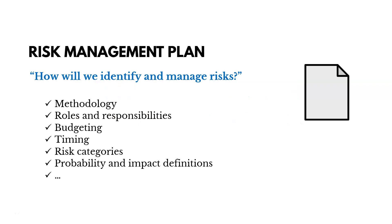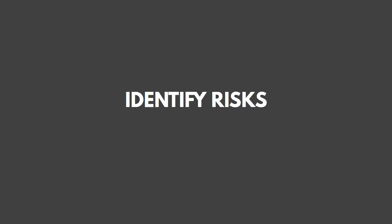As we start planning how we're going to conduct risk management, we generate a risk management plan. It includes things like what method we're going to use to identify and handle risks, who's going to be responsible, whether we're going to budget anything for handling risks, what the risk categories are, and how we're going to define probability and impact for our project.